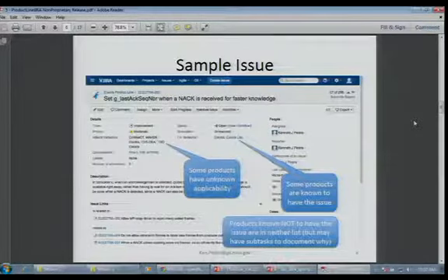So here's one sample issue and how that would look using this mechanism. And again, if you use JIRA, this should not look too startling. But the key is that in the affects version field, where ordinarily you would say, well, we found this in revision 2.1 of our software, instead I'm saying, well, we don't know if this version affects, but we would like to see if it affects the Connect project, the Maven project, the MRO Electra project, and some other projects that are members of this product line.